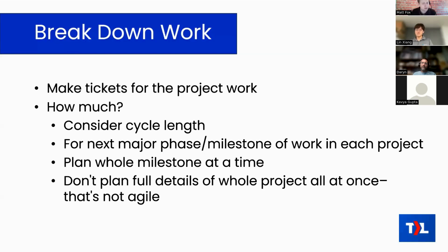Or maybe you're going to have to cut down the scope because you already went over budget, and you still got to bring the project as a whole under control. So you got to cut down the scope on certain things, and all of the planning that you did prior to that is now just wasted because now you're coming back to redo it. So try to minimize as much as possible the amount of planning that goes into later stages of the project, if you can.